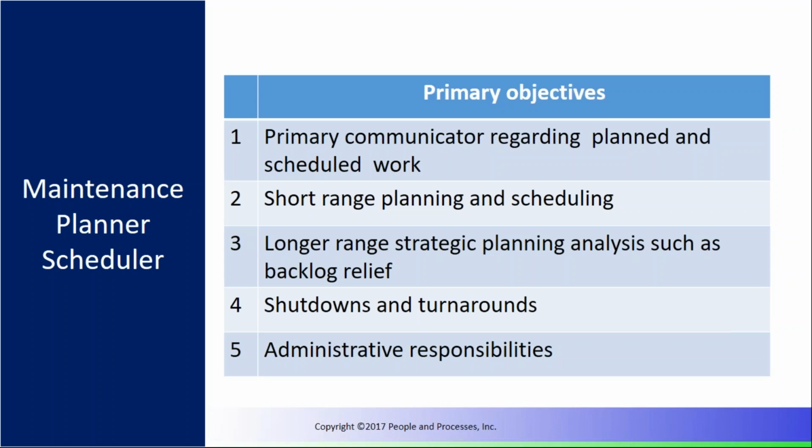And I see companies fall into that trap. Oftentimes it's a single person, so they use that planner scheduler and they have them massage the schedule in and out every day. But that takes them away from that forward focus that we want next week and beyond. So remember, the supervisors this week, planner schedulers next week.